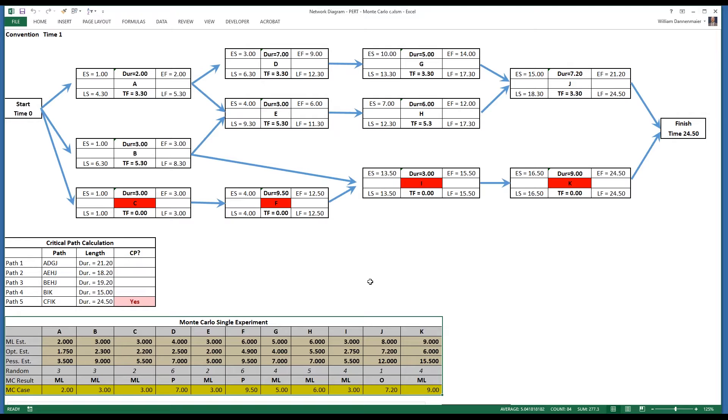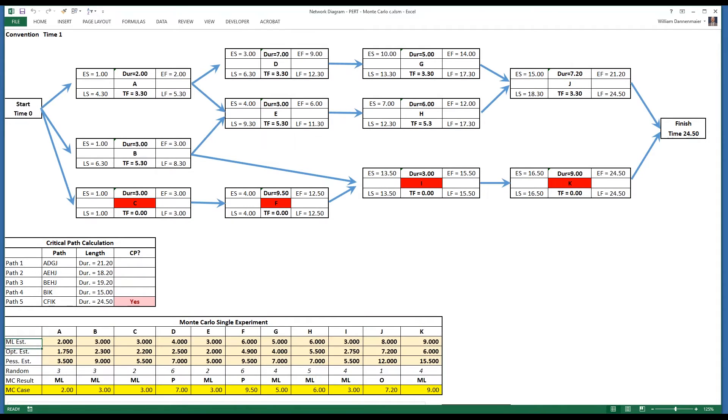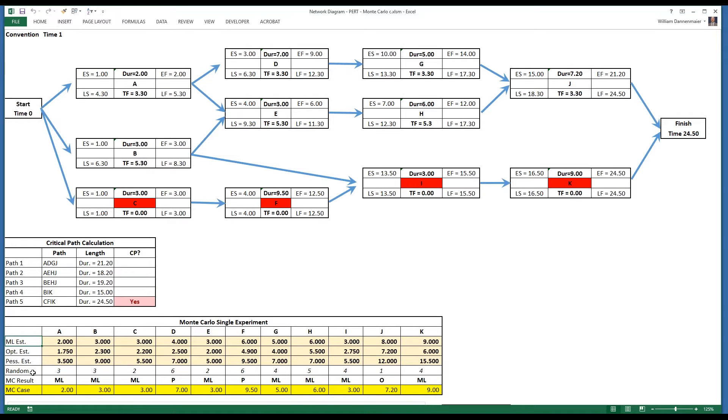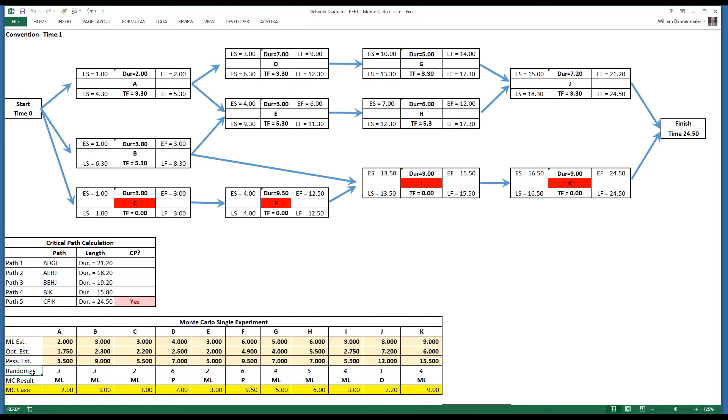In this area, for each task, an optimistic, pessimistic, and most likely estimate has been made. The random row below the most likely, optimistic and pessimistic estimates, the random row of the single experiment table is like a dice with random settings from one to six using the random function of Microsoft Excel.